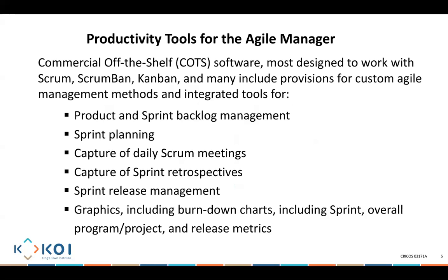So what do I do to ensure that the people are actually doing what they're supposed to be doing? Well, I have to keep monitoring what is happening in my team every single day. Every single day, the Scrum Master, the development team, and anybody else involved ask people three questions. If I'm the Scrum Master, I come and ask people: tell me what you have done yesterday, tell me what you are going to be doing today, and tell me what is stopping you from achieving progress. Three things.